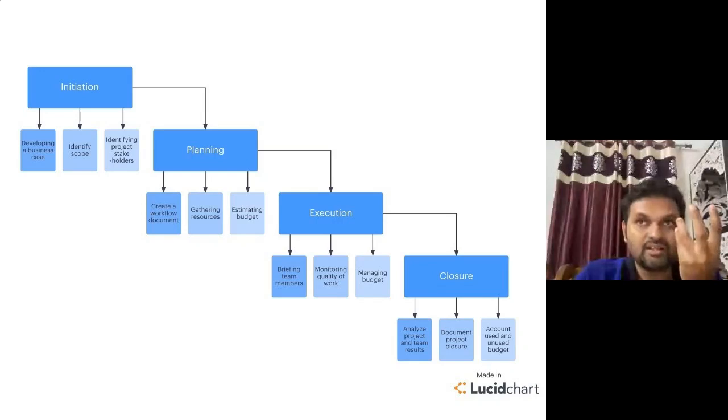Suddenly we get involved, and at the end we say, everything is going smooth, then why are the labor charges more in my project? We didn't get to know that, because the small things became a big element at the last.